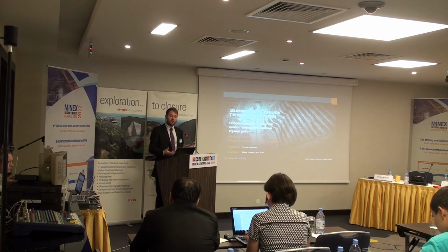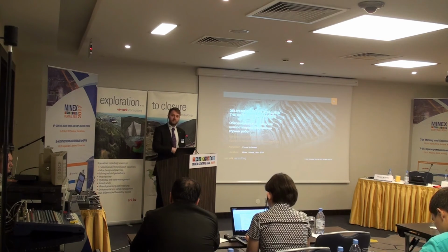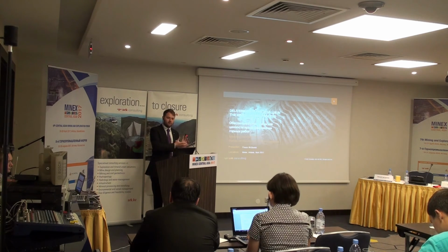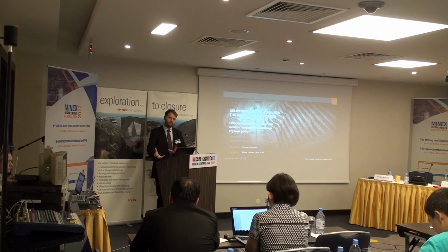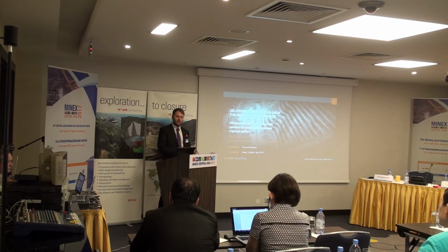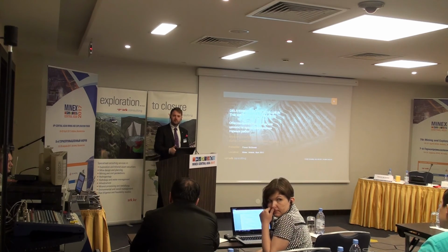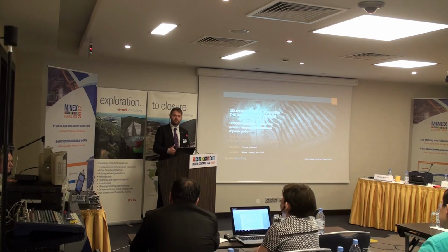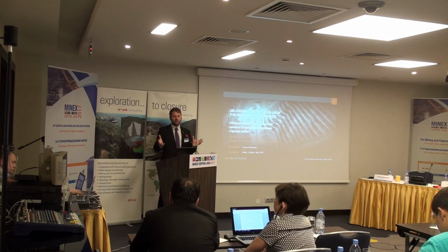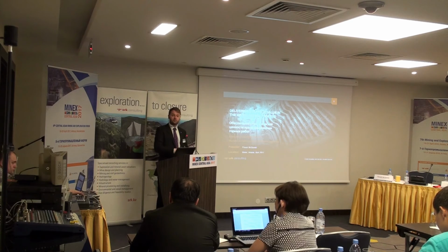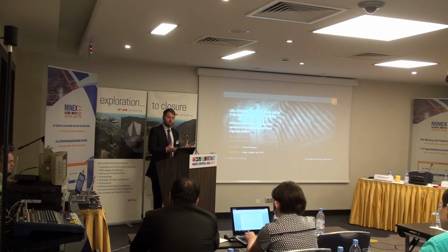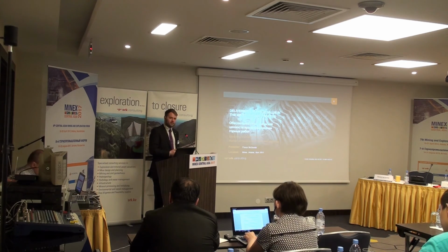It will also give us other outputs. For example, if we have the recovery in the block model, we can output the recovery. So we then have the schedule of the theoretical shells, which we can then take, do the design, and then do a detailed schedule to give us information down to maybe monthly or quarterly resolution. Now this overall plan can then be provided to a mine site as a strategic plan, and the planners at site can take this plan and make it into their medium-term and short-term plans.